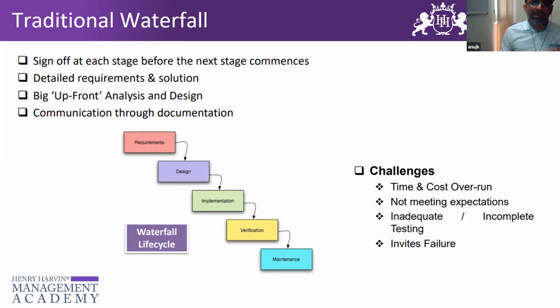So there was very little interaction with the customer. The customer was not involved, as Ravish and we talked earlier, on a day-to-day basis or in a 10 or 15 day cycle when we are building and showcasing. That was the upfront challenge in waterfall. You have to give a sign-off on each and every stage you move on. Right now, when you compare it with Agile, you have sprint reviews. Your customer is there, you can showcase to him, and if anything changes, let's document it, move to our next sprint, and modify and append it.